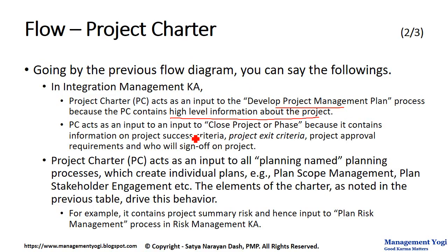The PC acts as an input to the close project or phase process, also in the integration management knowledge area, because it of course contains, as I said there, the exit criteria of the project. Also it contains the project success criteria, the project approval requirements, and who will sign off on the project.